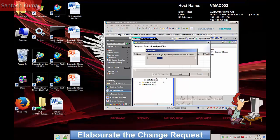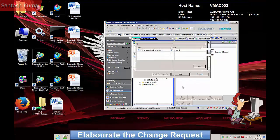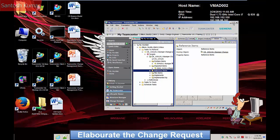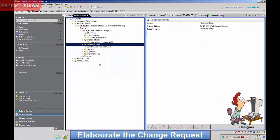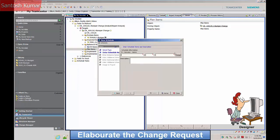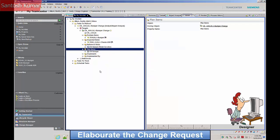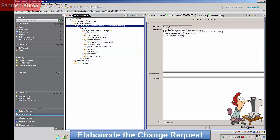A document explaining the reasons for the change is added to the reference items folder. This document is currently external to Teamcenter and is imported into the system. A new project or schedule plan is added to the plan items folder. The elaborate task is now complete and signed off.